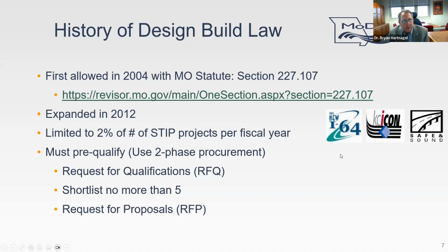And so the new I-64 was 12 miles of urban interstate reconstruction in St. Louis, Missouri. This was started in 2005, basically. One year we closed 6 miles. We closed an interstate that had 120,000 vehicles a day, and redid six miles, all of the overpasses and all that in that corridor. And then the next year we closed the other 6 miles, and did that work.